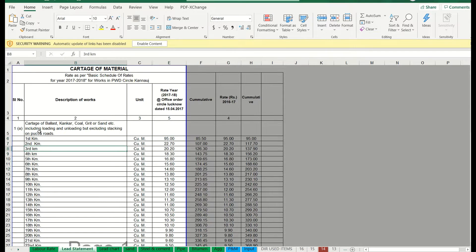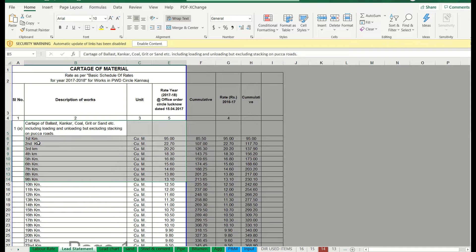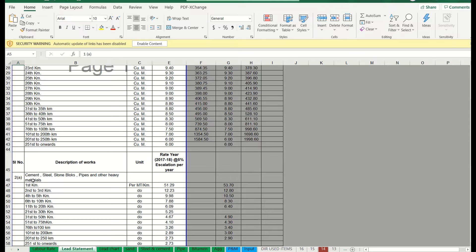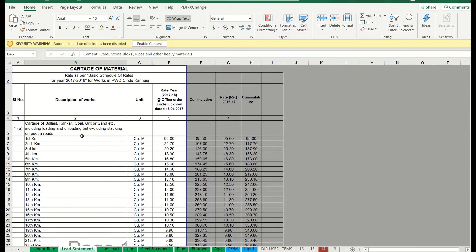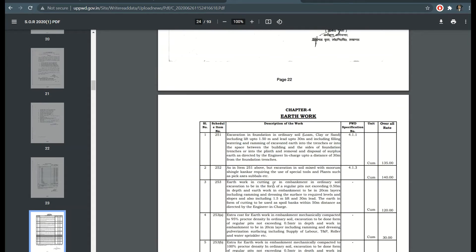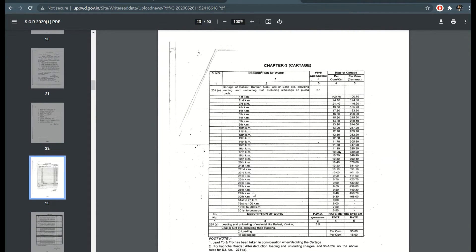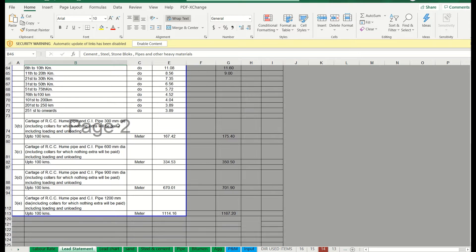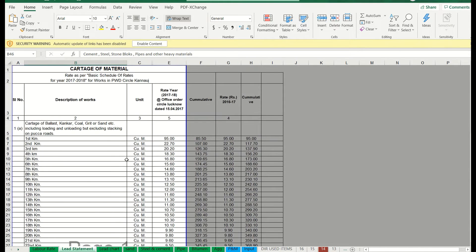Once that is done, you can see here there is a serial number, description — this is for cement, steel, stone, bricks and pipes. These will vary because they are different categories. There is also the bitumen section. All of these should be updated as per the current year. Once this lead statement has been completed, you have to prepare a lead chart.